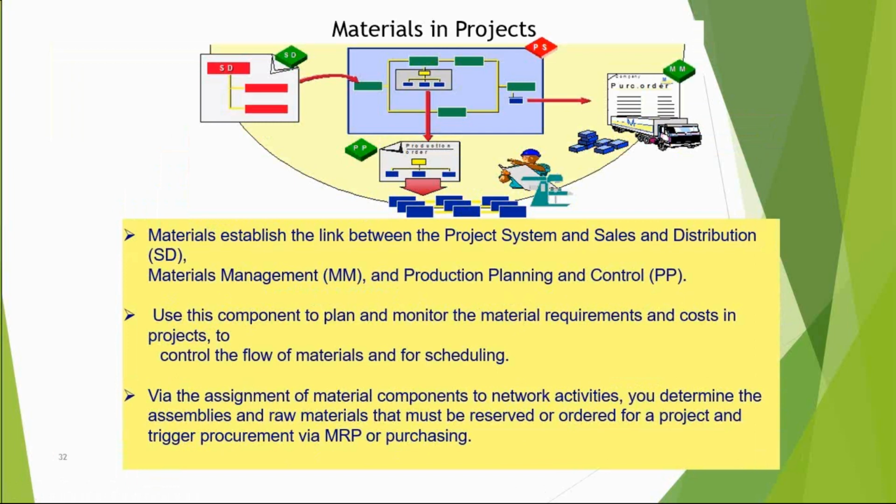So just to elaborate on that, you said that if it is internal processing, the internal order would be assigned to the activity, and with the MRP run, your planned order and the production order will happen. And in the end, the goods receipt is completed. And then you will have a project stock, right? The stock is assigned to the WBS element. And then if it is a customer project, we will be delivering the stock through a sales order, right?